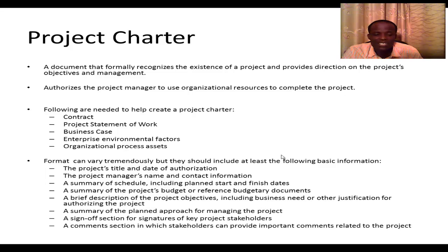There should be a sign-off section for signatures of key project stakeholders. It's very important to sign off. And last but not least, there could be a comment section in which stakeholders can provide important comments related to the project. So that's what a project charter does. And it's very important as a project manager to have that before the start of the project.